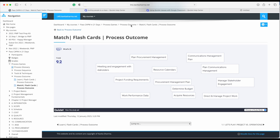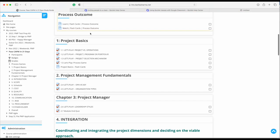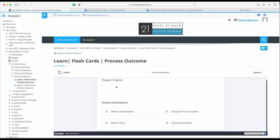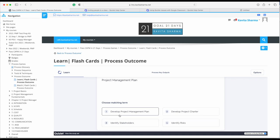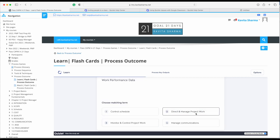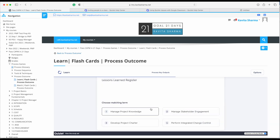You can also play it in learning mode. For example: 'Project Charter is from which process?' — I create the Project Charter in the Develop Project Charter process. 'Where do I create the Project Management Plan?' — in Develop Project Management Plan. 'Where is the team creating deliverables?' — in Direct and Manage Project Work. 'Where do team members file work status — time sheets?' — that's Work Performance Data, also in Direct and Manage Project Work. You can play it either way to learn process outcomes.